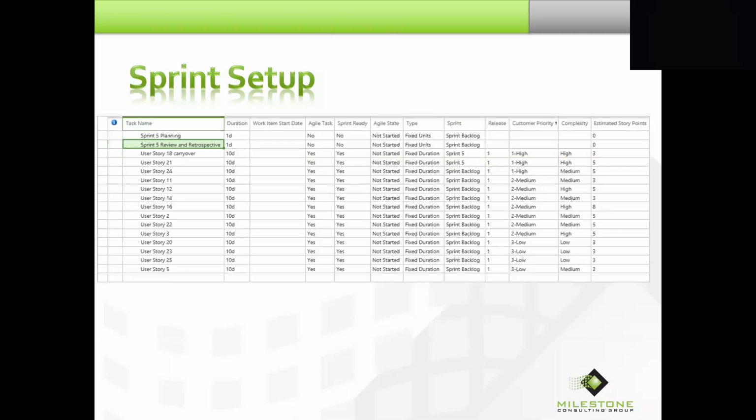So all I do is go to my backlog, and I'm going to assign specific user stories. Well, obviously, I'm going to pick the high priority ones. So let's change user story 18 carryover and user story 21 carryover and put them into sprint 5. And then I'm going to ungroup the view. And the reason I do that is I want to add sprint 5 planning. I want to add sprint 5 review and retrospective.